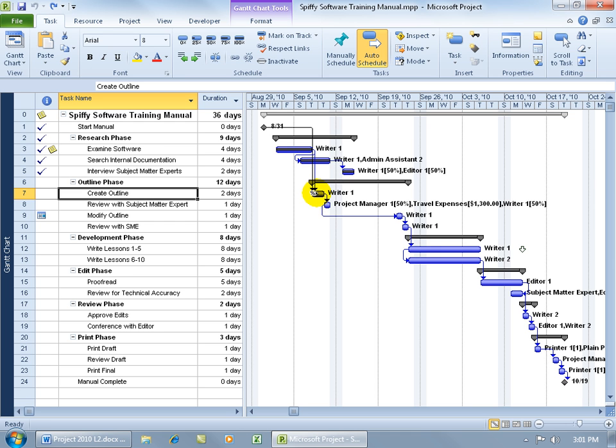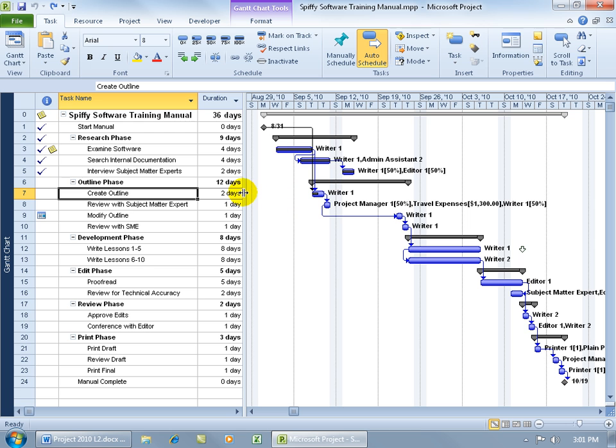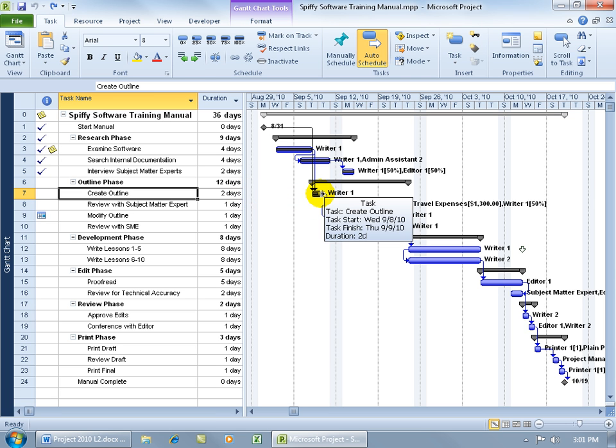When you hover over the black progress bar, it's 50% complete. So of the 2-day duration, he's got 1 day left to work. And if you hover over the blue task bar, you can see it's September the 8th and September the 9th. He cannot come in on the 9th, but he can come in on the 10th.